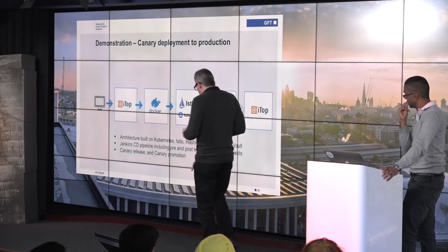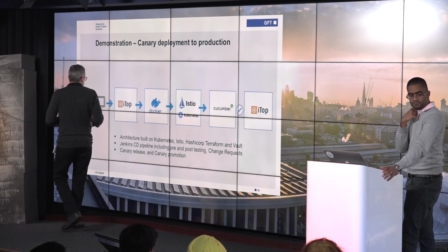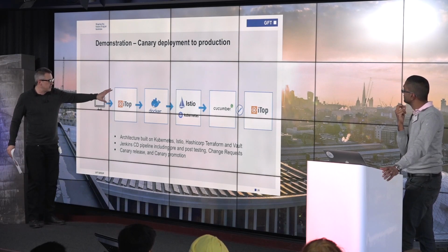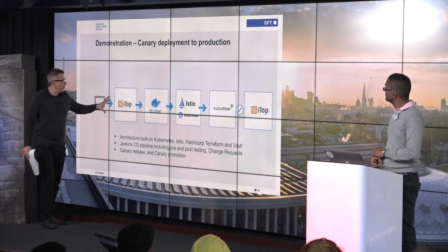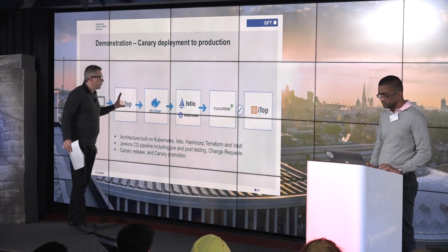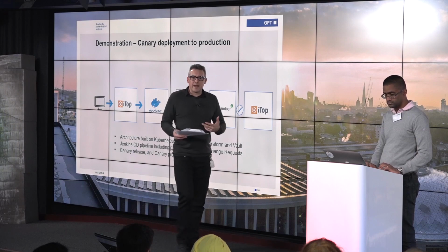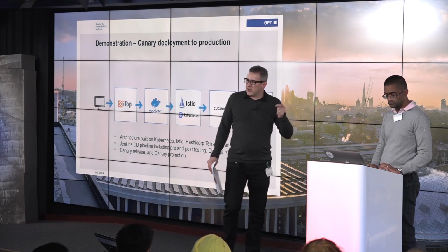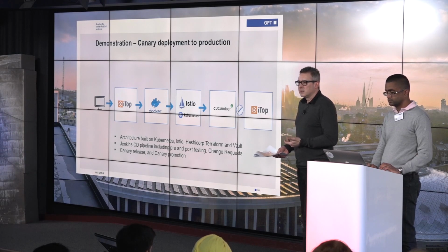And one of the things that I think is very key here, and Andrew touched on it from an ITIL perspective, is if you keep your changes small enough that they are inconsequential, then the need for a formalized, heavyweight, CIO-led change sign-off process is really kind of averted.